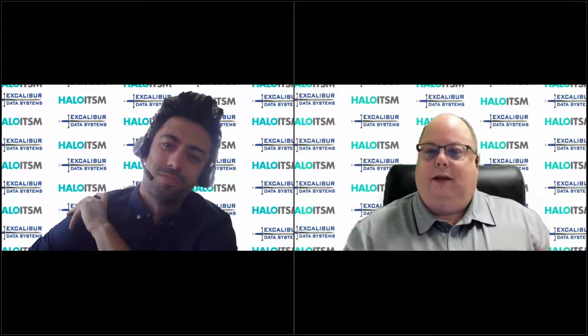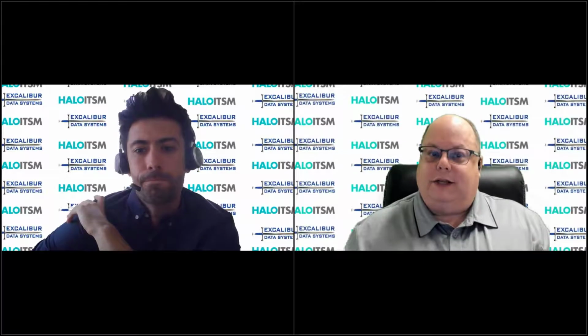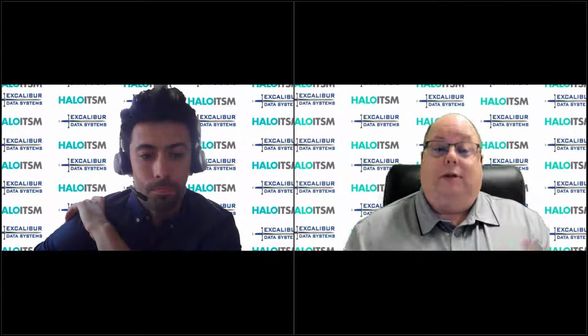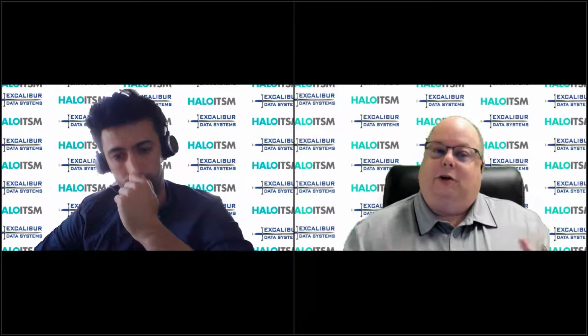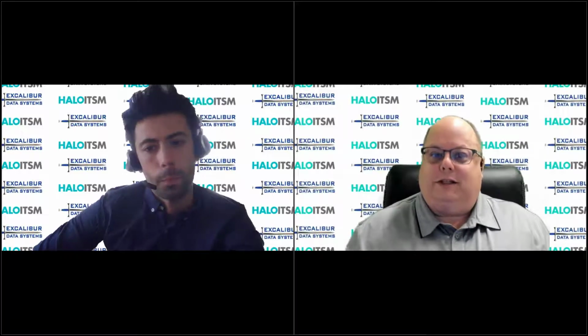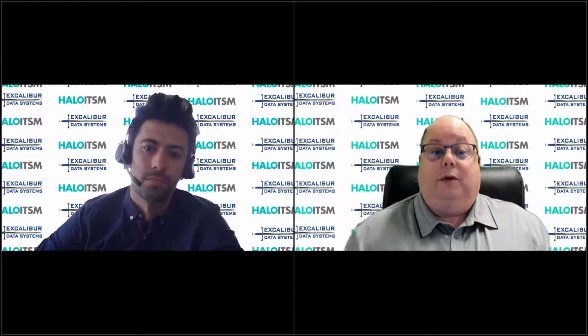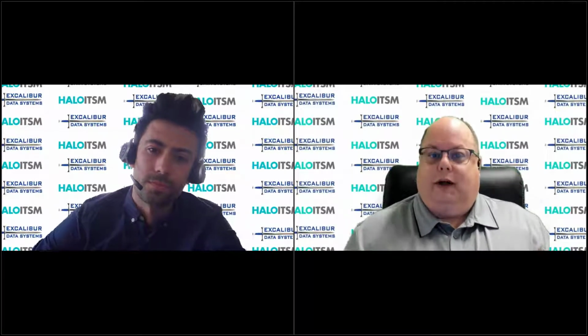It's a hard question to answer, but we can pretty confidently say with HaloITSM and a customer who's moderately prepared to talk about their processes, typical implementation times run 1 to 3 months, and that really is variable because it's going to depend on the number of process areas and the process complexities. You start looking at change management, and somebody has a complex approval process. Those take time to configure, but the timelines are relatively short. We can stand systems up, sometimes even in weeks. It really depends on what the customer's needs are.